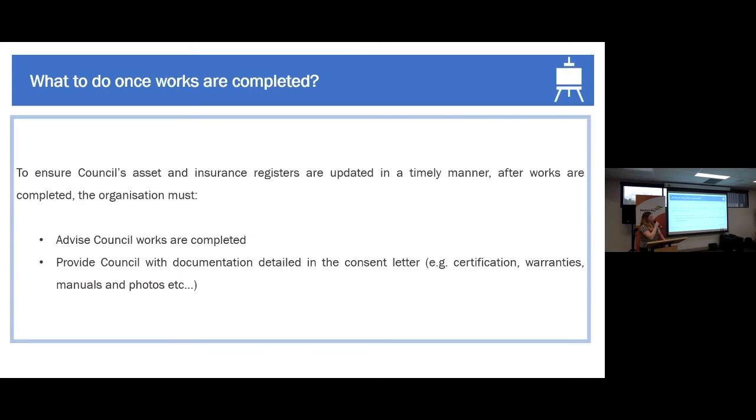Okay, so what to do once the works are completed. To ensure council's asset and insurance register are updated in a timely manner, after the works are completed, the organisation must advise us that the works are completed. So let us know, boast that that shed is done. We want to celebrate with you that it's all completed.